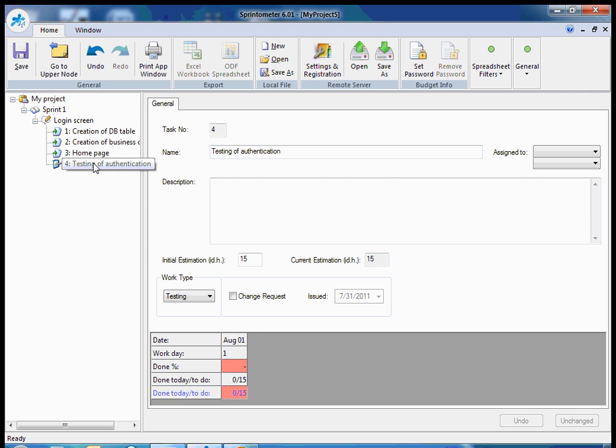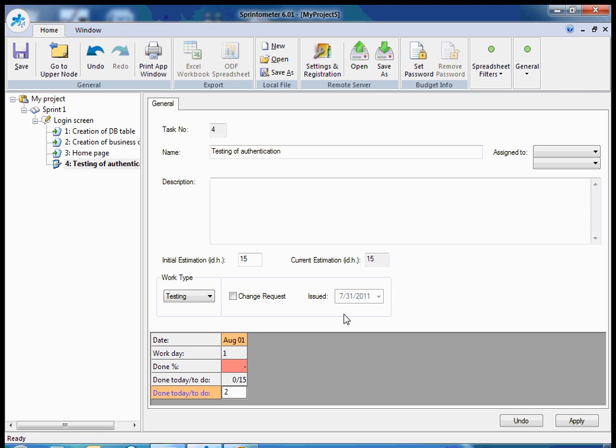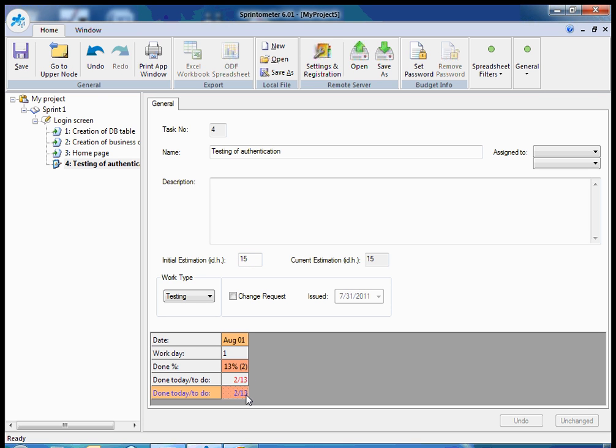Testers can also do their time reporting. For example, they can say I spent 2 ideal hours on the testing of authentication. And if there is no value provided after the slash, it will be calculated automatically. So I just apply. And because the application knows the original estimation, it can calculate the left time automatically: 13 ideal hours.